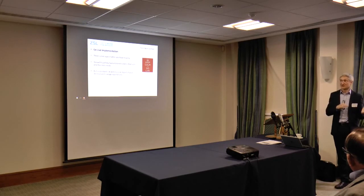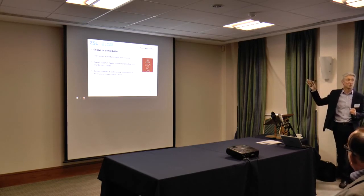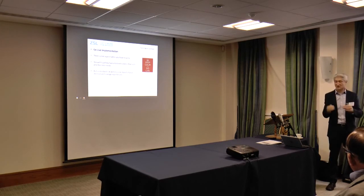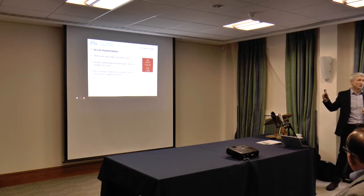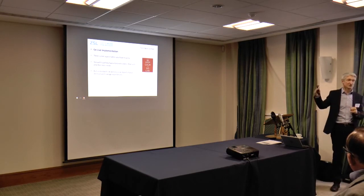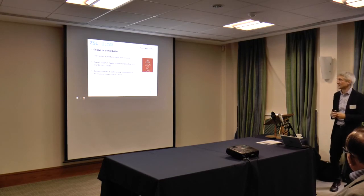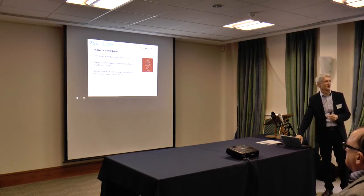But that's hindsight. At the point we reached on that date, was it the 1st of February this year, we sat down and we looked at all the risks, all the things that we thought we had got right, all the issues that we knew still had to be solved, and we thought we have to do it. If we'd missed that window, we couldn't have gone live till probably September, October time, and the overrunning cost, just in terms of staff and resource and delay to the business, was huge. So you're in a bit of a quandary, but ultimately you have to make a decision. We jumped, and we went, oh, thank God we're going live.